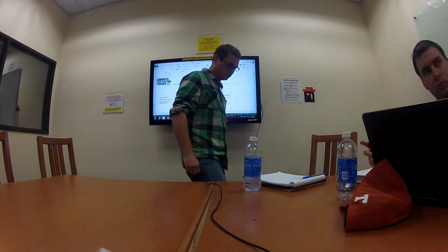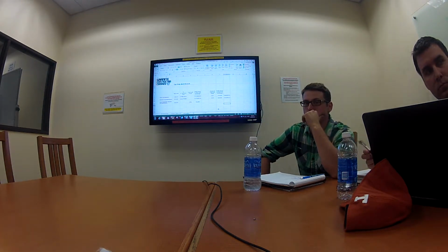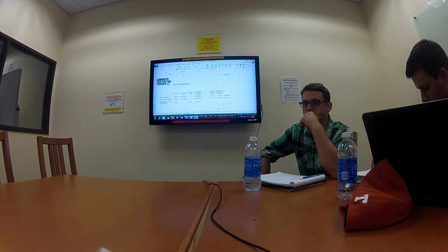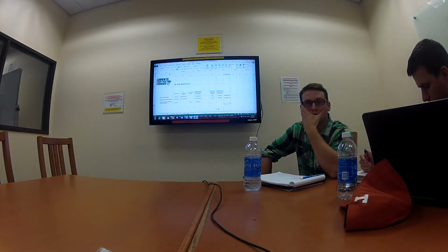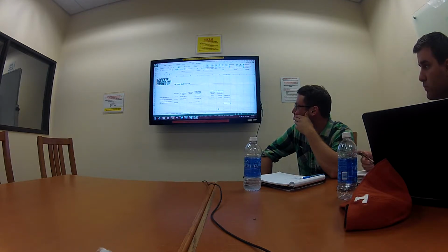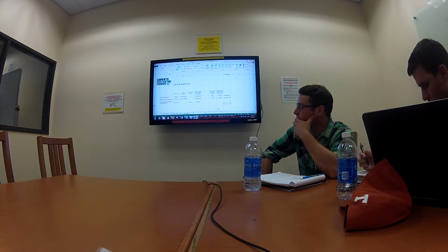You decide at the end of the job what percentages you want to do in here. So based off of that, looking at the total cost average of most stuff, 2/3 of your profit is going to end up rolling into the labor and equipment. So I didn't really pull them out of my ass, but I had to come up with them in a different way than using the standard 20, 15, 10, 5. But you could do that as well if you wanted to. It was a little bit more convoluted.